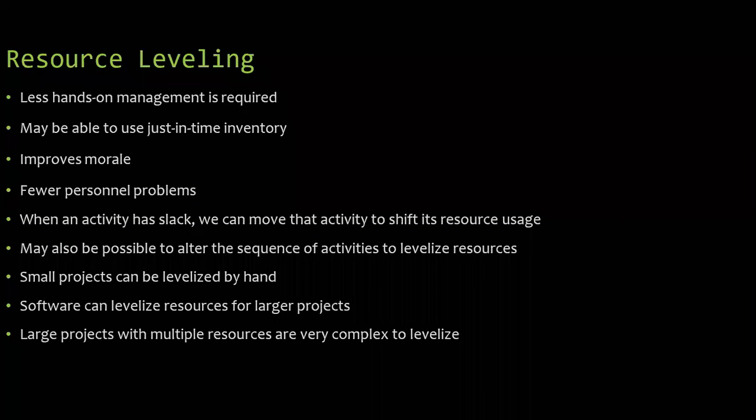So what does leveling indicate? Leveling doesn't change the duration of the project. Leveling is just shifting the activities. Shifting the activities means you can do this particular part early and this part later. In the original schedule, part A is initial and part B is later. But due to some delay, we can start part B early and part A a little bit late. So that shifting of activity is possible.